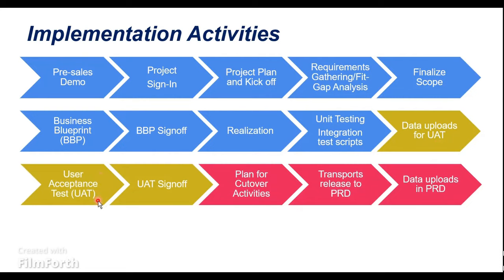The consultant from each module will support the UAT process. If there is a need for trainings, that will also be covered in this phase, and they are going to help in the in and out process of completing the UAT by their users. Once the UAT has been completed and the business has found that everything is working fine, according to their business process, and the system completely fits into their business process, they are going to give a sign off on the UAT. This phase could be one of the milestones predefined in the project plan.